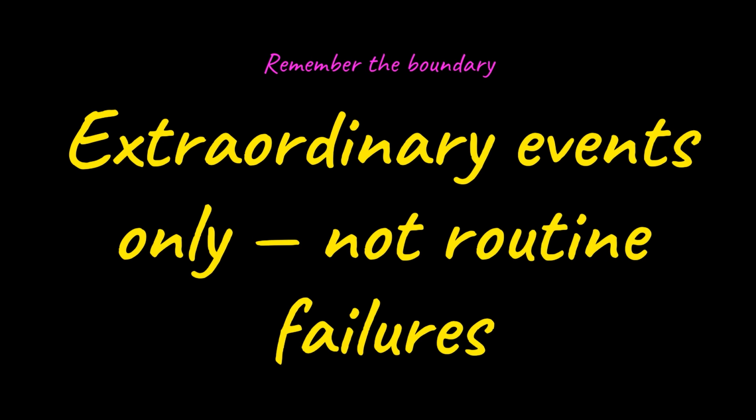Courts interpret force majeure language narrowly, so the specific wording in each contract matters. If an event was foreseeable or could have been mitigated, the clause will not apply. Force majeure is a precise legal tool, not a general escape hatch for inconvenience.